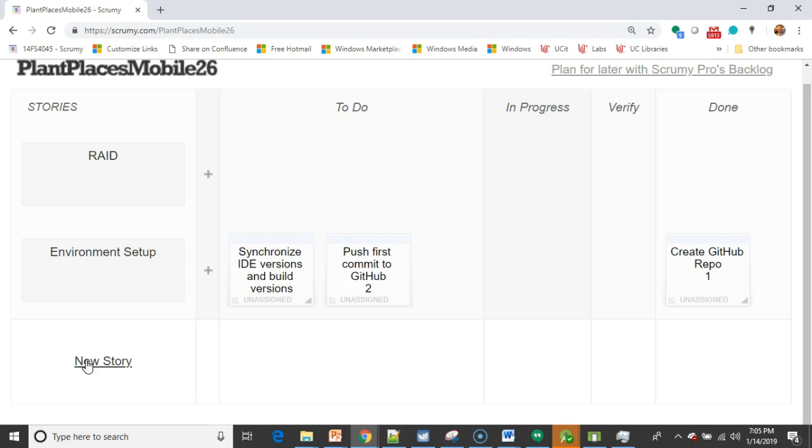That's step number 1. Number 2, in progress, there should only be, count your team members. If you have 3 team members, there should be no more than 3 things in progress. In other words, we're assuming that our contributors are going to work on 1 thing at a time, and they're not going to be spread thin across multiple items. Now, if something's blocked, we need to mark that as blocked, and then you can move on to something else. But there should only be a maximum of 1 item in progress for everybody on the team at any point in time. If you see 25 things in progress, you're not working right. People are spread too thin, and people are doing different things and getting distracted. So, little note on that.